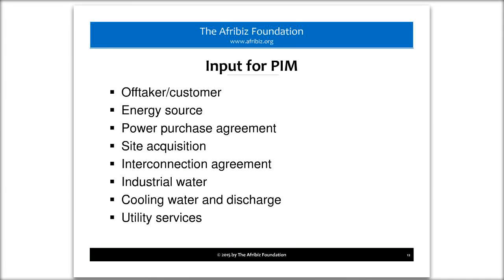And I can give you a very good example in South Africa. Basically when you have tenders, you get the power purchase agreement from Eskom. Essentially, what's in that, and I don't know if there's a difference in a physical document, is the idea that you're going to be interconnected to the grid. Well, right now, South Africa is kind of backlogged. They're now in their fourth round.